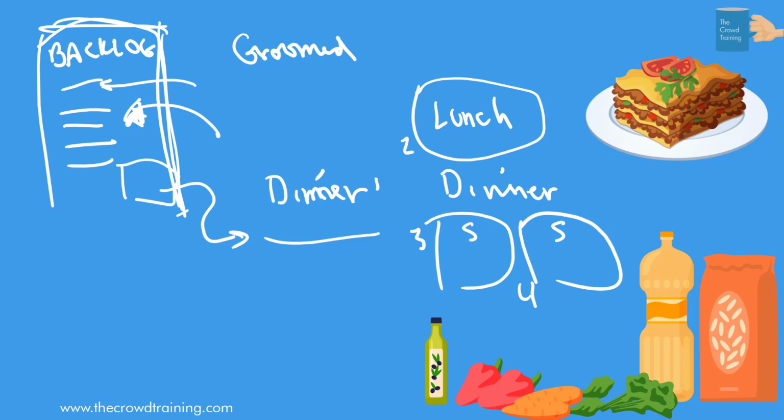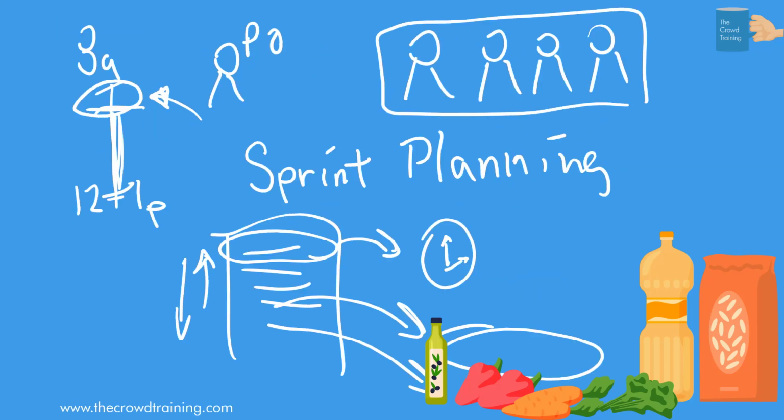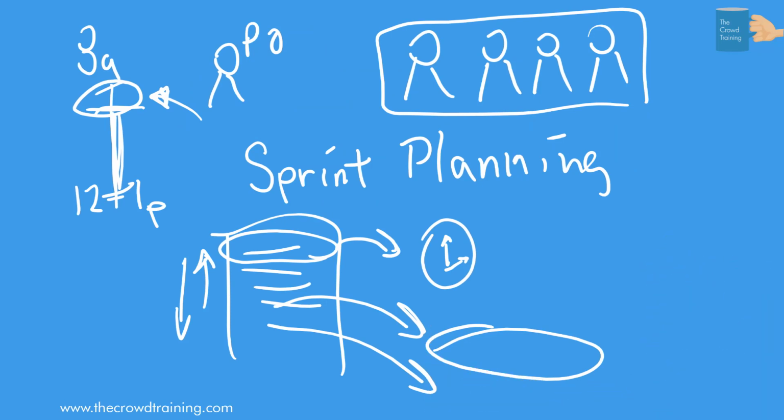But we are really seeking out to build this backlog refinement inside of our sprints so that we have better preparation for the next sprint instead of being surprised or having to try to do everything during the sprint planning. So the sprint planning then is our chance to commit and figure out all the tasks that need to be done for our particular sprint that we're working on.